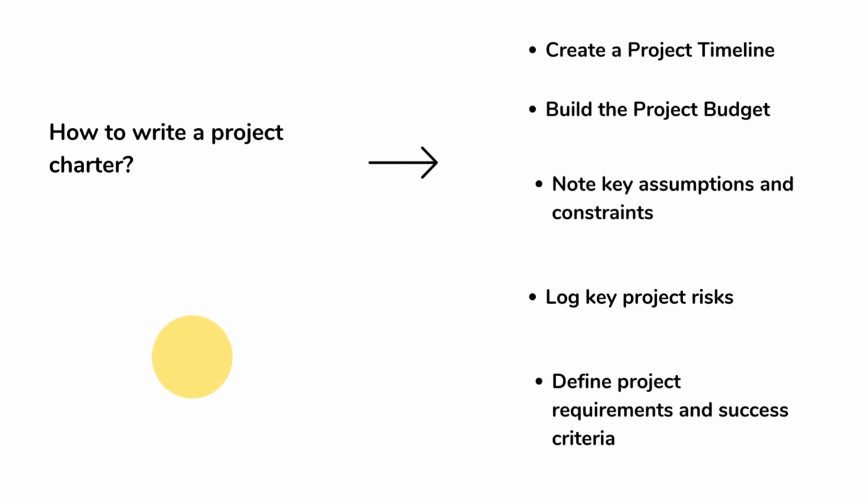Identify all potential risks that could arise in the project so you are not taken by surprise. Here, you will want to highlight the most probable or impactful risks so that stakeholders are aware of them early. This should be followed by a risk register and risk management plan in your project plan, where you detail how you will resolve those risks and who on the team is responsible for catching and fixing them.